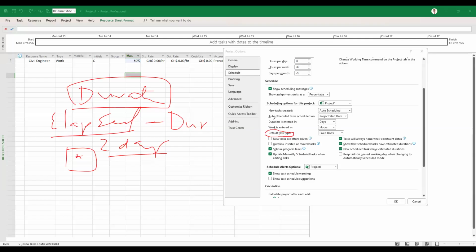These 2 days, you are not going to work 24 hours a day, so you are not going to work 48 hours on this particular activity. But by the time you say you are done, 48 hours may have elapsed. And within that 48 hours, you may have worked 16 hours. It means that every day you work 8 hours.